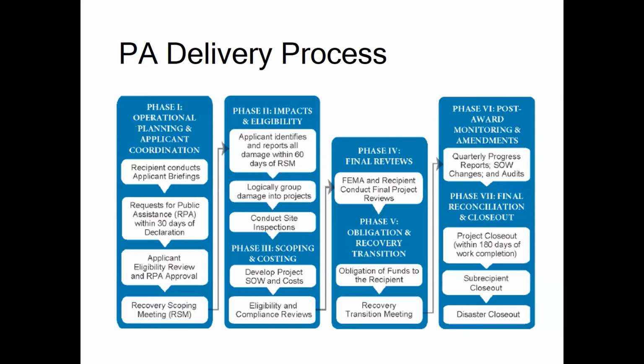Applicants are assigned to a program delivery manager, or PDMG, by FEMA. Your PDMG will coordinate an exploratory call to gain an initial understanding of impacts and discuss requirements and next steps. The call is usually scheduled within 7 working days of assignment.